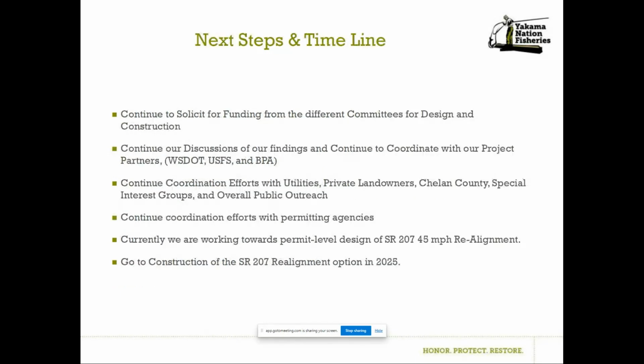Our next steps: we're going to continue to solicit funding from the different committees for design and construction. We're going to continue our discussions of our findings and continue to coordinate with our project partners, Washington State Department of Transportation, the United States Forest Service, and Bonneville Power Administration. We're going to continue coordination efforts with utilities, private landowners, Chelan County, special interest groups, and overall public outreach. We'll continue coordination efforts with permitting agencies.